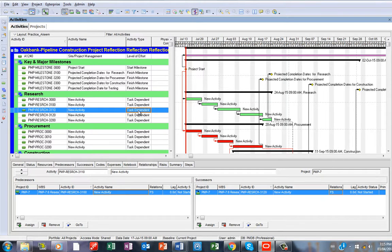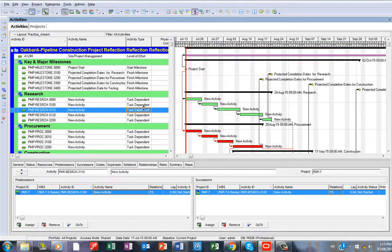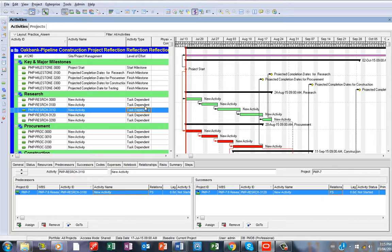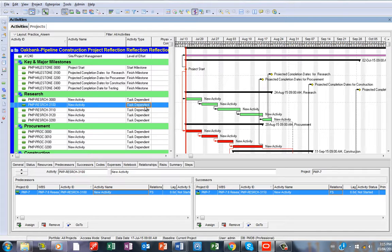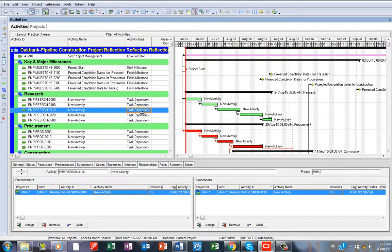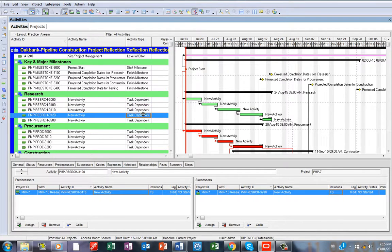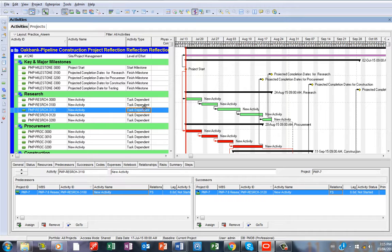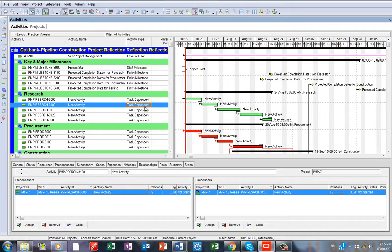From experience, the dangling task is another major area which you need to look into, because you don't want to leave any task open-ended. As a result, you'll want to create a filter to ensure none of your tasks are left dangling.